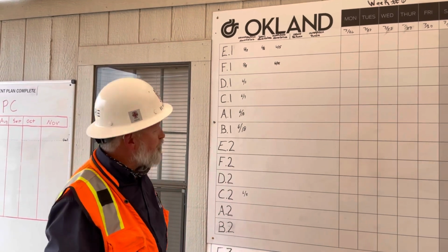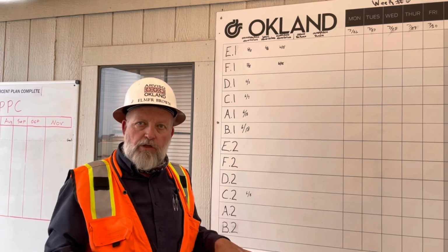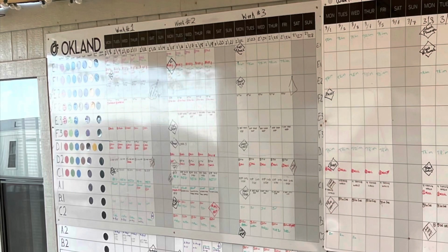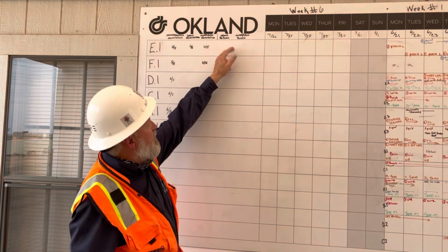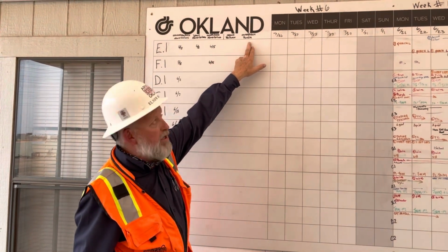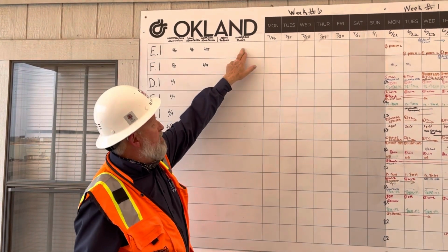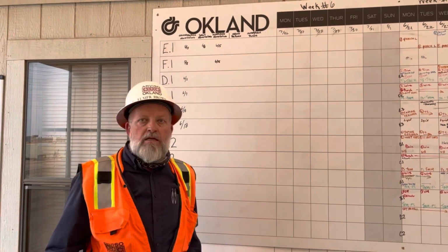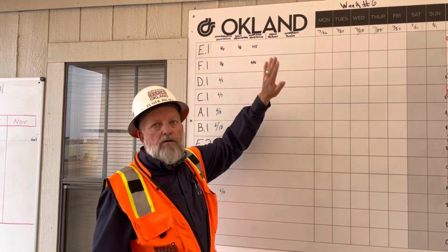The date we write on here is the date they actually did the initial inspection. When we sign off all those areas as that inspection being closed out, each of these areas will get a dot to indicate, as we're working our way through this, which areas have been done and which haven't. Same thing here, Oakland punch list, and then owner architect punch list. The date we actually walk the punch list we'll put here, and same way for the architect, and then the date that we complete the punch list items, boom, we'll get a red dot or a green dot.